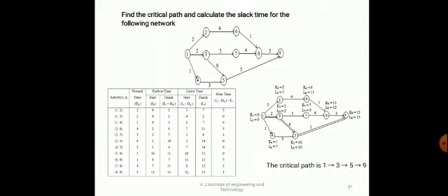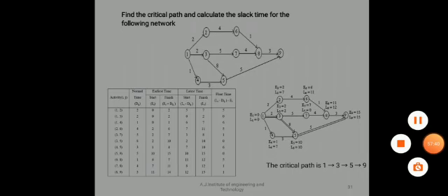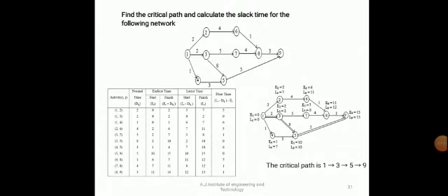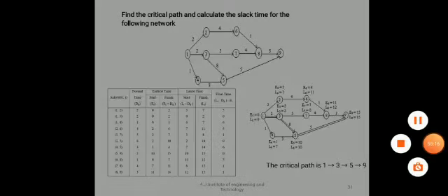In CPM, the critical path method, whatever time durations we consider are assumed to be certain. In other words, certain projects may be made of activities which may never have been attempted before, such as R&D projects, and therefore their durations are uncertain and probabilistic. In such cases where activities are non-deterministic in nature, PERT is employed. In PERT, activity durations are represented by a probability distribution. About that we can study in the next class.